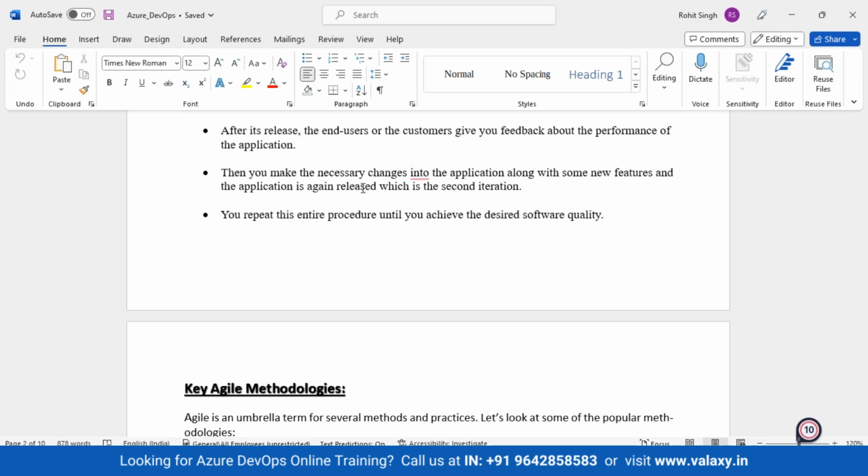It was very difficult to accommodate, because your team is involved in doing something right now, and you are asking your team to go back and do the requirements and design again and do the implementation again. Because of that, the project end date was getting extended. In Agile, nothing as such. If there is any emergency change or requirement change, you can easily accommodate it, because you're doing things in iterations. Keep that in mind.